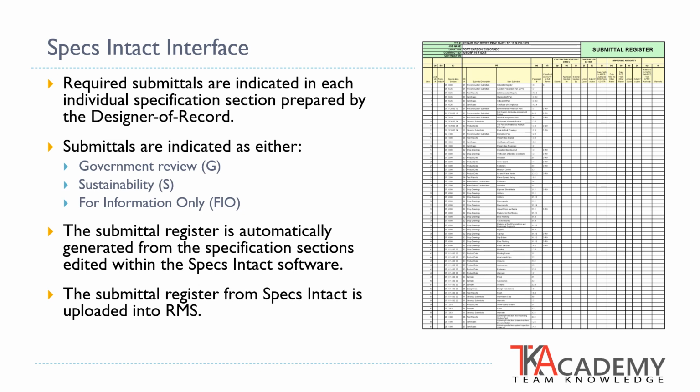The submittal register is automatically generated from the specification sections edited within the SpecsIntact software. There is no need for a manual development of the submittal register. The submittal register from SpecsIntact is exported as an Excel worksheet and uploaded into RMS.